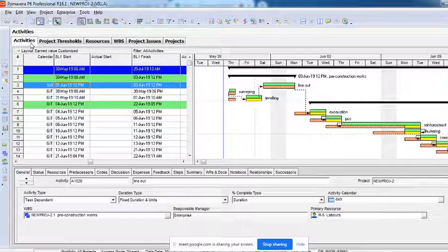But some issues, probably schedule variances, cost variances, impacts, liquidities, or productivity problems, are something which your Primavera can calculate automatically, for which you will have to create a parameter. You just have to go to monitor issues or monitor thresholds. The moment you go to the monitor threshold and say monitor, it will generate a report and tell you how many issues there are. It will create those issues automatically. So that's what we saw here in this threshold.